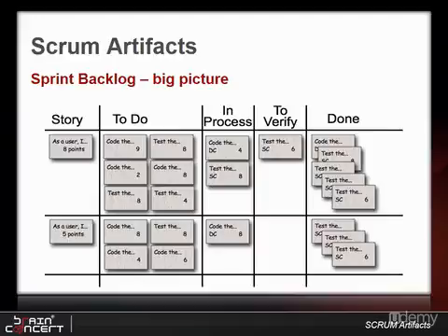The sprint backlog includes 4 items, which are as follows: the list of user stories within the sprint in order of priority, the relative effort estimates for each user story, the tasks necessary to develop each user story, and the effort in hours to complete each task.